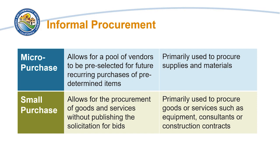Micropurchases are for the procurement of items that do not exceed $10,000 in the aggregate. Micropurchases allow for a pool of vendors to be preselected for future recurring purchases of predetermined items and are primarily used to procure supplies and materials. Small purchases allow for the procurement of goods and services that do not exceed $250,000 in the aggregate. Under small purchases, the procuring entity is not required to publish solicitations for bids. The small purchase method is primarily used to procure goods or services such as equipment, consultants, or construction contracts.